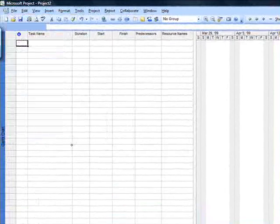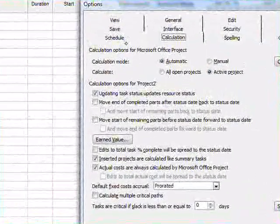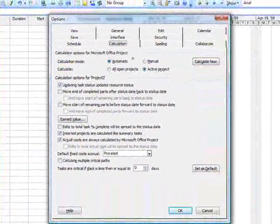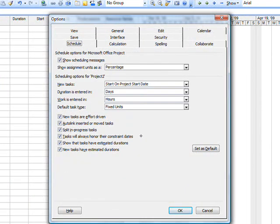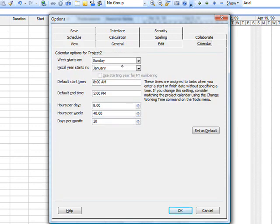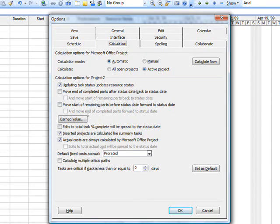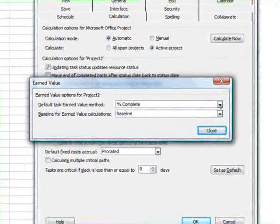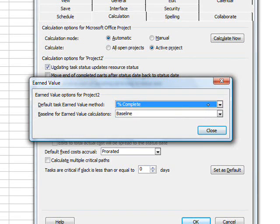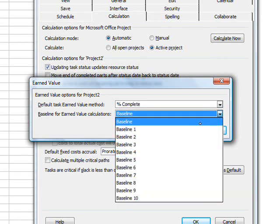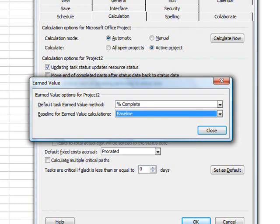Go to Tools > Options. First, select Schedule. Observe these defaults: new tasks on start date, work is entered in hours — that's very convenient. Then go to Calendar and set the default calendar up for the project. Then go to Calculation and select Earned Value. Select Percent Complete, and then select the baseline that you're going to store the earned value data in. This is important to note: Microsoft Project stores the earned value information in the baselines.